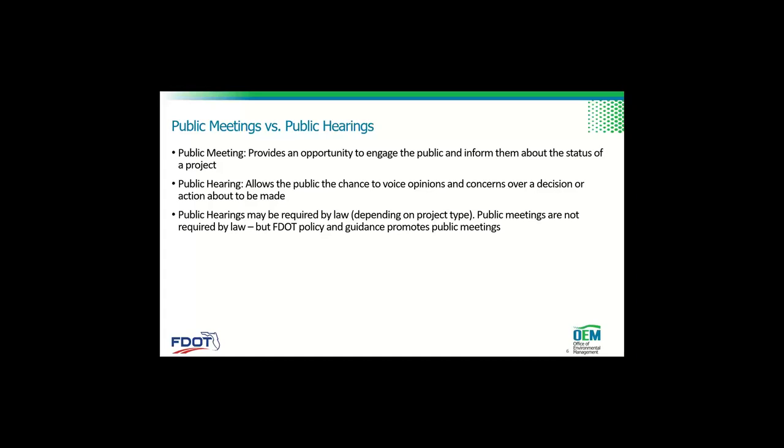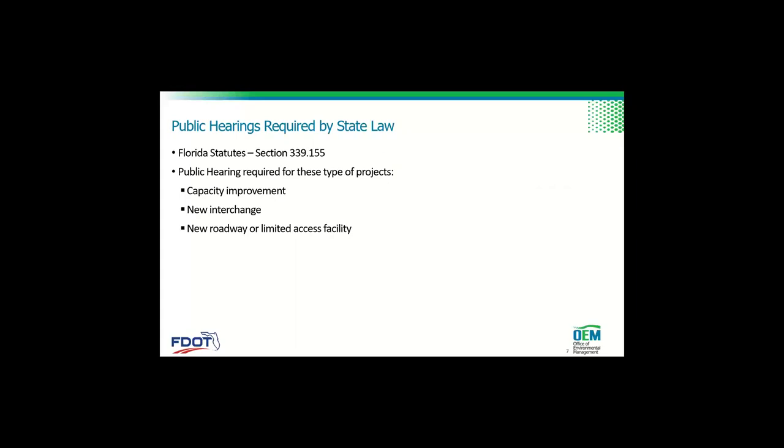Hearings may be required when there's a significant change in design after PD&E, or a significant time has elapsed since the approval of the PD&E. There are certain times when a public hearing is required by state law.